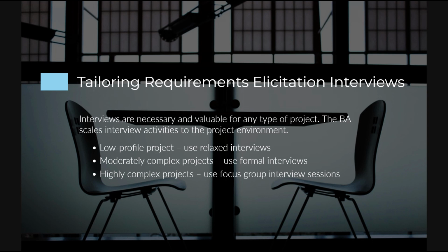If the project is moderately complex and has some risk, then you should do formal interview sessions with key stakeholders so that you produce some predetermined deliverables. And then if it's a large, highly complex project that has significant risk, then you should do really formal focus group interview sessions with key stakeholder groups with budgets and timelines for securing stakeholder approval on project deliverables. So those are some examples of how you can tailor the requirements interviews to the size of the project.